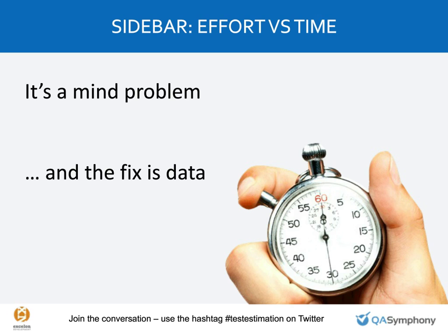And even if we made testing free on that project, even if we press a button, get instant test results, bam, magical, faster than automation, those test results would include bugs. Those bugs would need to be fixed. We would need to wait for a new build. We'd press the button again, and then we'd have to wait again. Then the project would still be late. So testing wasn't the bottleneck on the project. Or if it was, there was a greater constraint, which was the actual fixing.